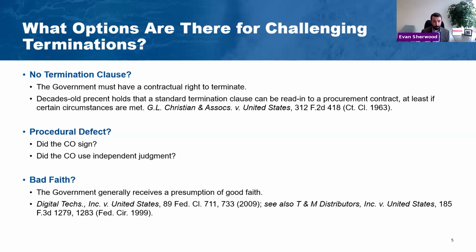Just as one example, federal leases don't normally have your standard termination for convenience, right? And there are other types of agreements where the startup costs are so high, you might actually have a position that the Christian doctrine doesn't apply, but this is an exceptional case if you find yourself there.